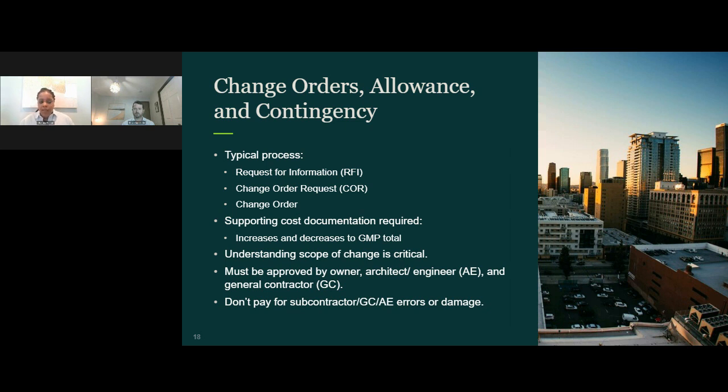From a proposed change order standpoint, making sure that you're not just getting information from your construction manager, but they're also getting that subcontractor backup for quotes from the vendors themselves, and making sure that those are actually itemized. So not saying, it'll be $2,000. I want to know if that $2,000 is related to labor, materials, equipment, if there are any exclusions from that, just making sure that it's very clearly specified and signed off by both parties for inclusion within an owner change order.